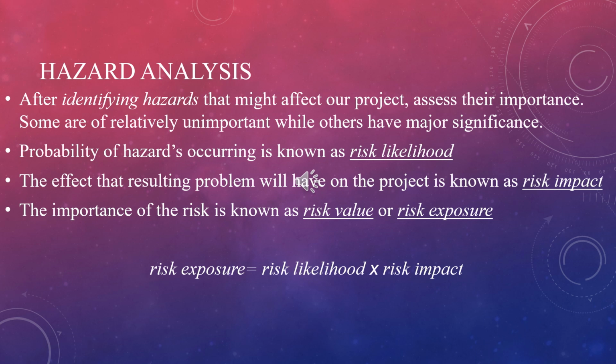The risk exposures of various risks can be compared with each other to assess the relative importance of each risk, and they can be directly compared with the cost and likelihoods of success of various contingency action plans.